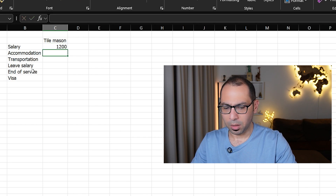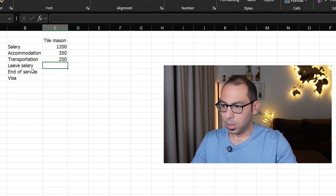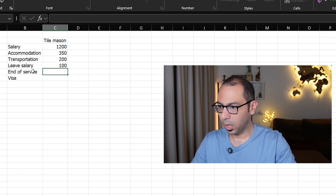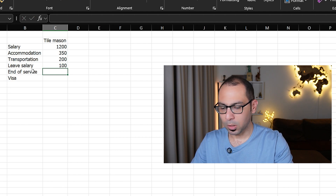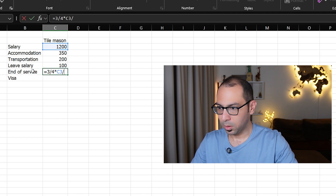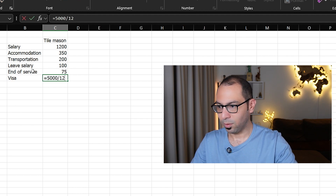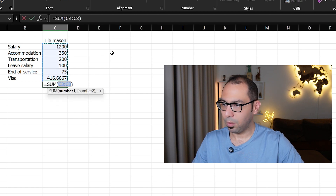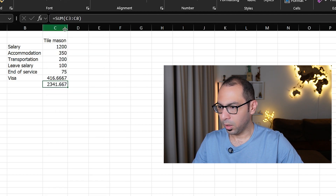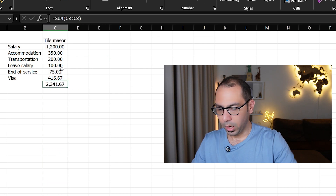If the tile mason's salary per month is 1200, accommodation is 350, transportation is 200, leave salary is one month per year (1200 divided by 12 = 100), end of service is about three weeks (3 x 4 divided by 12), and visa cost is 5000 per year (5000 divided by 12), the total cost per month for the tile mason comes to approximately 2400.